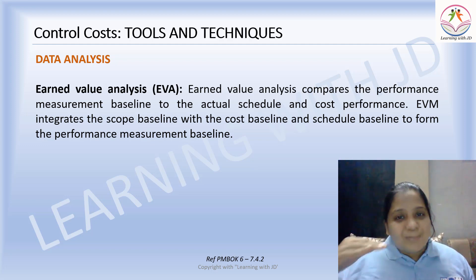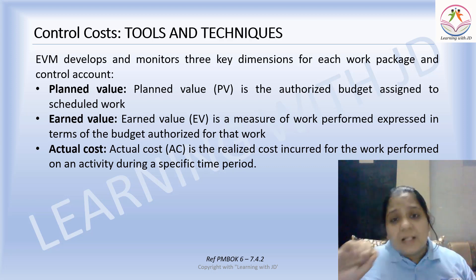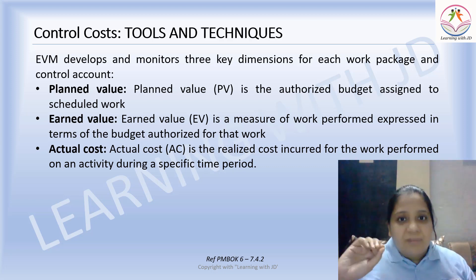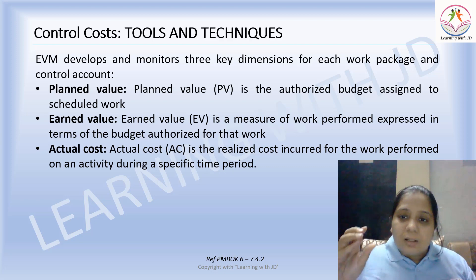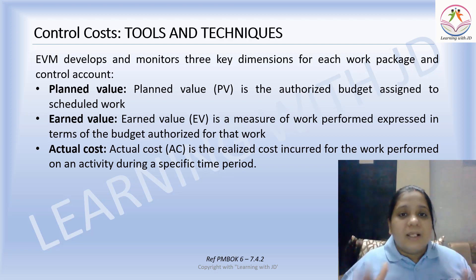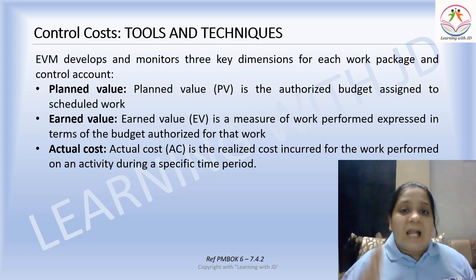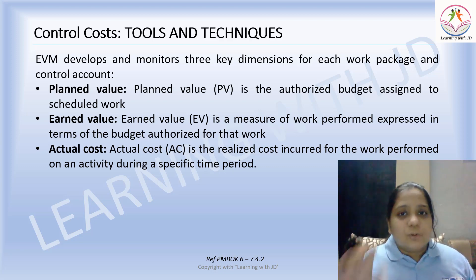EVM develops and monitors three key dimensions for each work package. Planned Value (PV) is the authorized budget assigned to scheduled work — how much work needs to be completed. For example, if one-fourth of the work is worth 100 rupees, then PV equals 100. This is the budget assigned to a particular scheduled work.